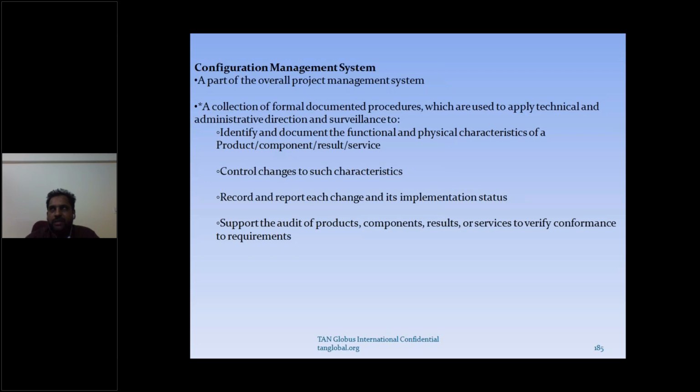For example, you are doing dam construction, and now there's some change in the design. What is the configuration management system there? They collect all the design printouts, burn them, and then give you the new design documents, because everybody has to use the new design documents, correct? Same way we also have the configuration management system. It's part of the PMIS, project management information system.